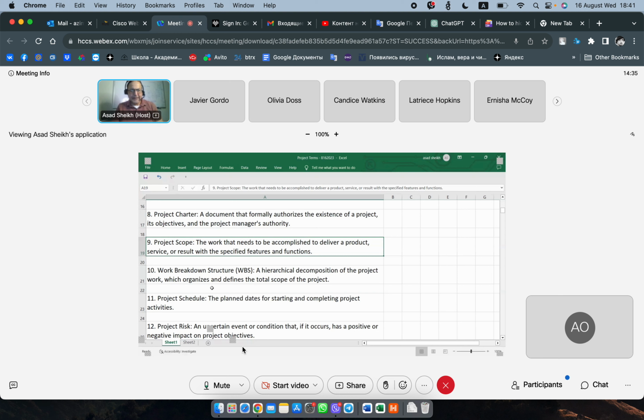result? Work breakdown structure. We talked about that very briefly. It comes out of the requirements. So when you complete the requirements and start to build your scope statement, the next step would be the WBS, which is sort of a hierarchical display of all the major components that a project would deliver. And then from there, we build our schedule. So that's a step in between.